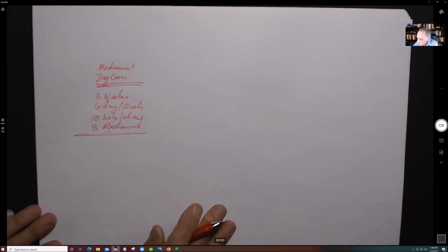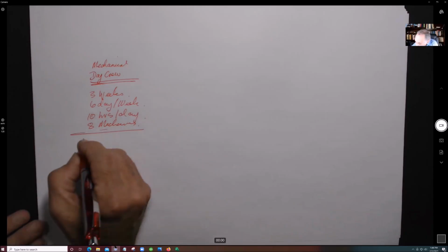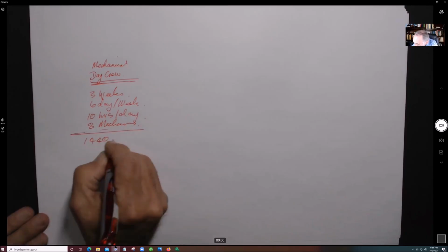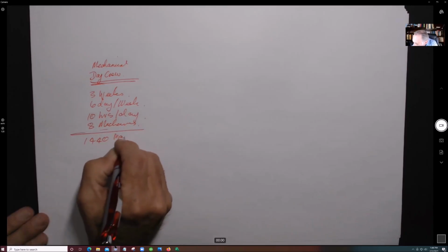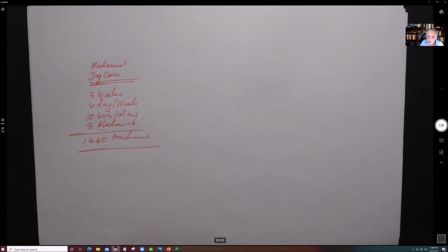So what is our total? Our total is 3 times 6 times 8 times 10, which is 1,440 hours, and that's man hours of mechanical availability to do this work.